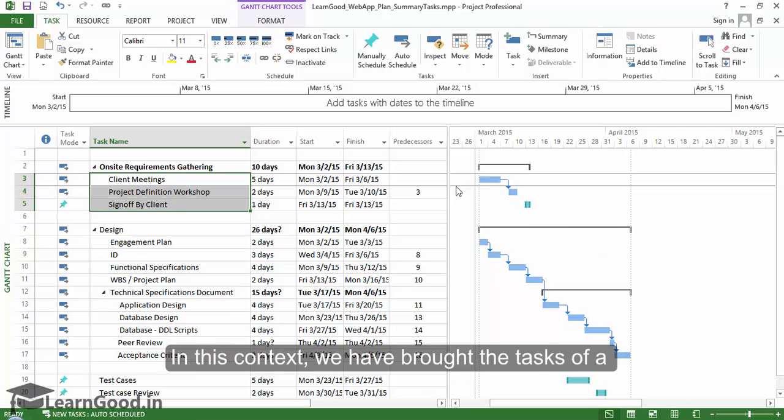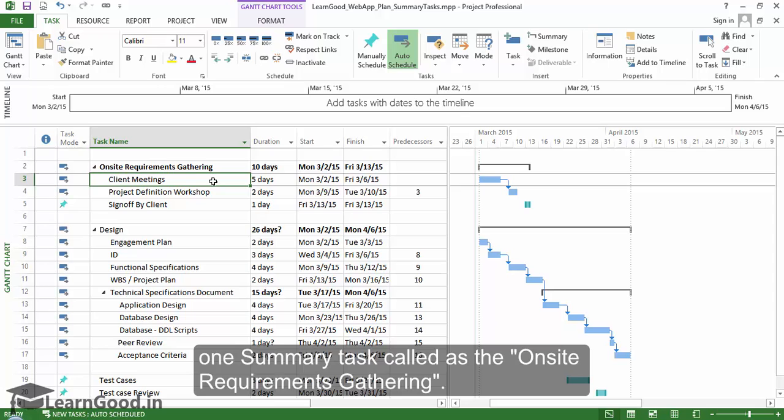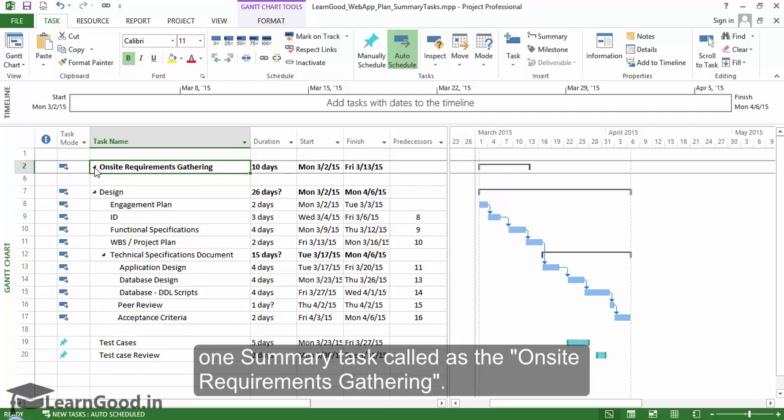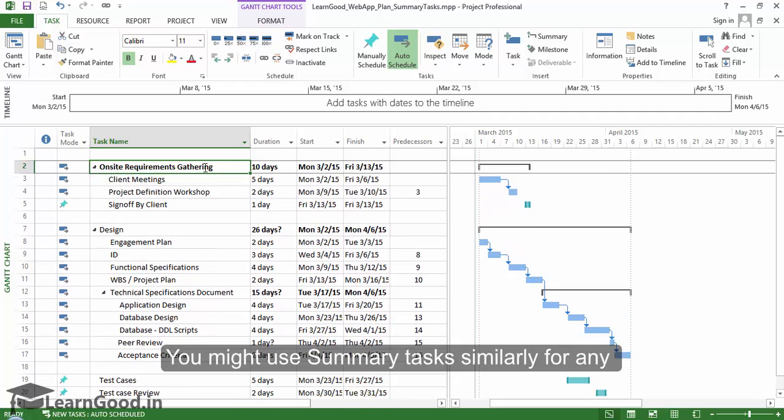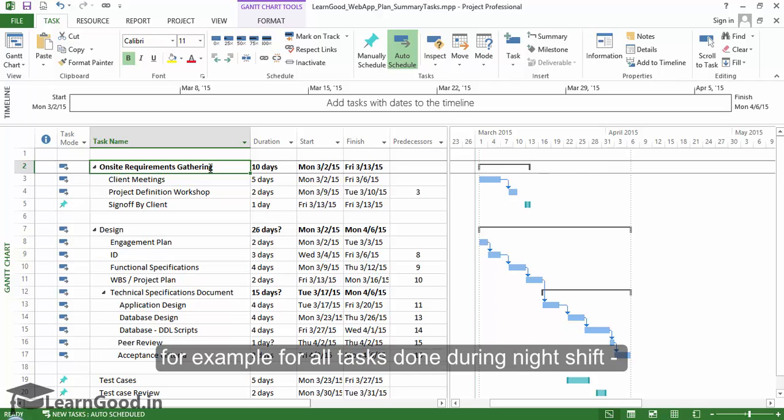In this context, we have brought the tasks of a particular phase of the project together under one summary task called on-site requirements gathering. You might use summary tasks similarly for any other logical grouping, for example for all tasks done during night shift or all tasks done by a particular team.